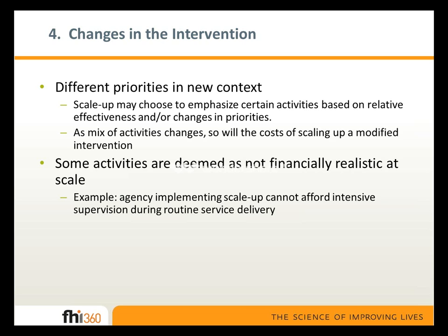And also sometimes there are activities in the pilot that are deemed to be not financially realistic at scale. A good example of this is that often in our pilot projects we put quite intensive supervision as one of the pilot elements. And when the intervention is scaled up, that same level of supervision likely won't be provided, and so in that case too the pilot cost would be different than the cost of scale-up.